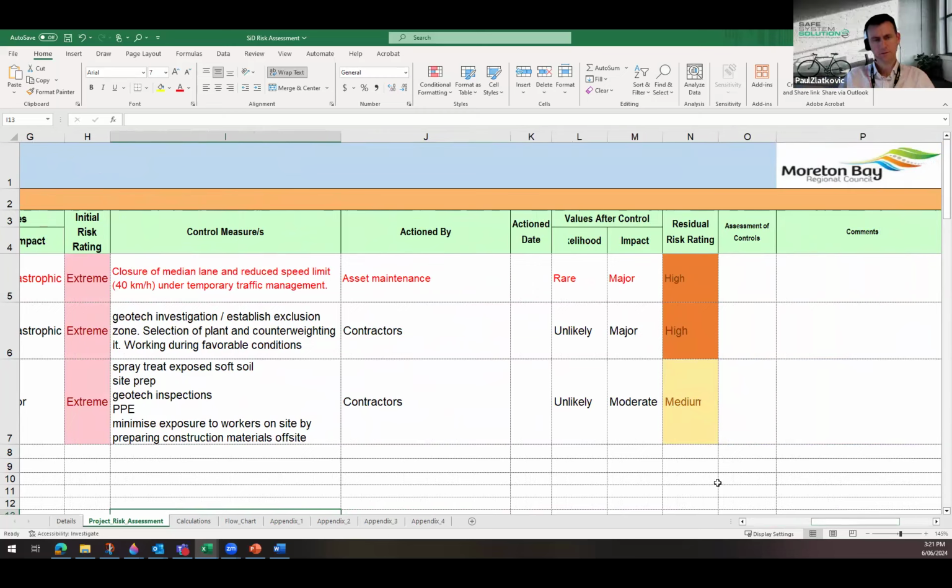Yeah, that's an interesting one because Jared, I think, was involved in the project, but part of the project is to remove that loose debris at the crest of the cliff and also in the midsection of the cliff. So naturally, removal of materials is going to cause some of it to fall to the base of the cliff. So that could be an almost certain descriptor there. A very important one to consider and develop control measures for.